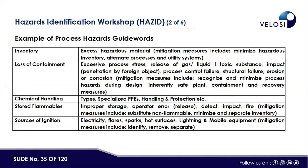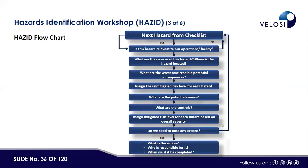Examples of process hazard guide words and their sources include chemical handling, specialized PPE handling, and protection. Stored flammable materials, improper storage, operator error, and defects are sources of impact. Fire mitigation may include substituting non-flammable material, minimizing and separating inventory. Sources of ignition include electricity, flare spark, hot surfaces, lightning, or mobile equipment.